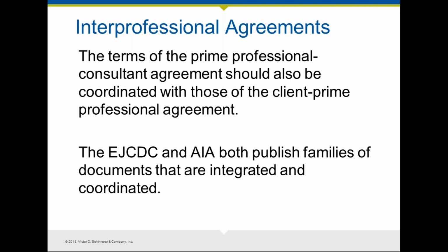Obviously, generally speaking, for a prime, you do not want to give a limitation of liability to your subs unless you have such a similar limitation on your services, because that puts the onus on you.